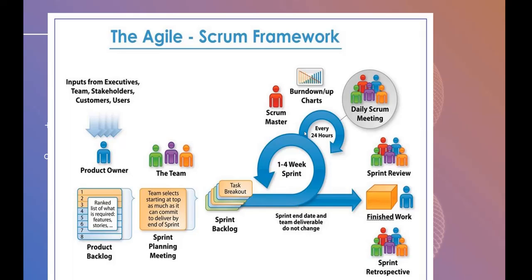So when the team members are working, if the product owner comes and gives a new requirement to the developers, as a Scrum Master, your responsibility is to protect your team from any disturbance from the outside. For example, if the product owner comes and wants to talk with the developers, first he needs to talk with the Scrum Master and then go to the developers. Sometimes the Scrum Master handles the questions from the product owner, sometimes not, depending on the situation.